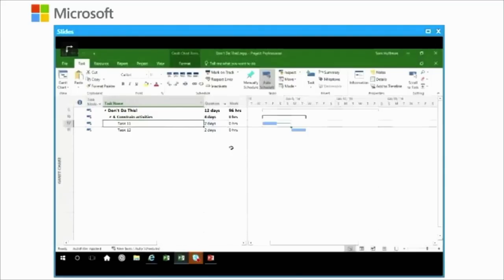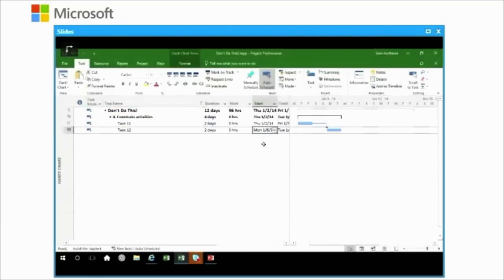Now, this idea of constraining. Oftentimes, constraints can be entered by just typing in a date. The start and finish fields, folks, are calculated fields. What Project is using is the duration of a task, and if there are any sequences in your project tasks. And then that is used in calculations to determine the schedule. So artificially putting a constraint on a task, occasionally it's necessary, it certainly should not be the rule.